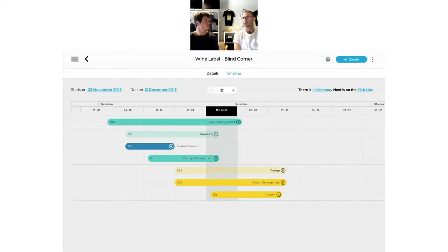Yeah, anything we can give away in terms of where we're thinking this might head? Yeah, so we were talking a little bit before about how quickly things change in the studio or in an agency. So what we want to introduce here is the idea of dependencies. So if, for instance, you have items grouped in a phase and the dates of that phase shift out, you should be able to drag that phase and all the items below it follow in sync.